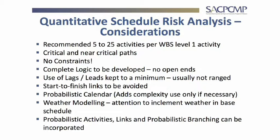Look at critical and near-critical path activities when linking risks — focus on activities that will drive or threaten the critical path. There must be no constraints in the schedule or you won't get an accurate simulation in your schedule risk analysis. Complete logic must be developed with no open-ended activities. Use of lags or leads should be kept to a minimum, and start-to-finish links are to be avoided.